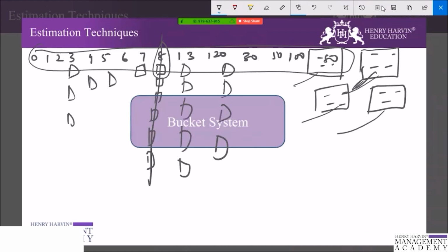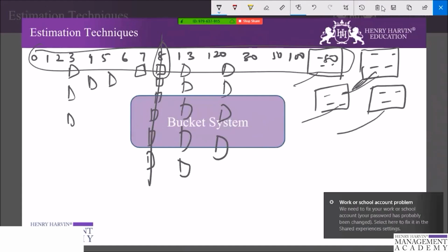Again, if the random item has clearly skewed the scale toward one end or the other, rescale the items. That is, if the first item is actually very small and should be in bucket 1. The second step is to divide and conquer: allocate all the remaining items equally to all the participants. Each participant places items on the scale without discussion with the other participants. If a person has an item that they truly do not understand, then that item can be offered to someone else.